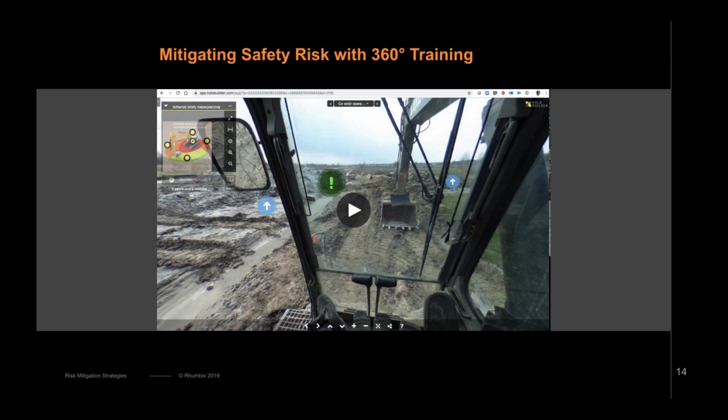When you look at construction litigation, almost 70% of cases do involve, in a very large part, what the submittal process looked like. And when you have teams who are manually analyzing documents, just based on the concept of human error, there is a pretty high chance that the critical requirements are being either overlooked or being pushed off due to a time crunch. By being able to leverage systems such as Pipe Auto Specs, not only are you beginning to structure data in a way that is much more manageable, but you're able to identify and mitigate risks beginning from day one. You're able to understand what are those important tests and inspections that need to be performed, and you can actually put together a strong quality assurance as well as quality compliance plan.